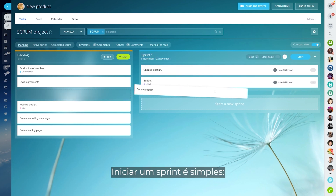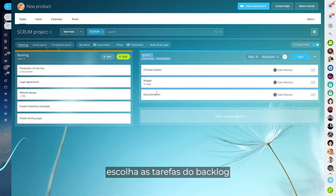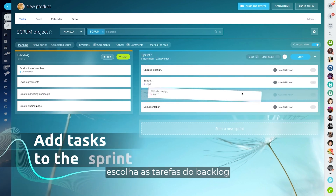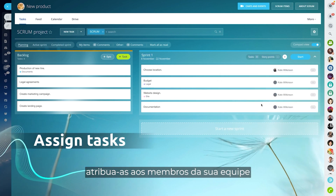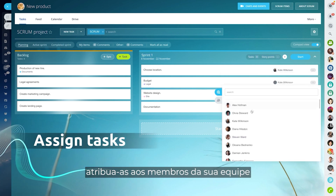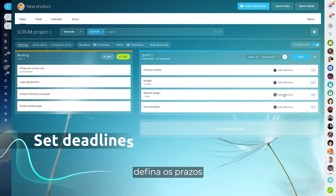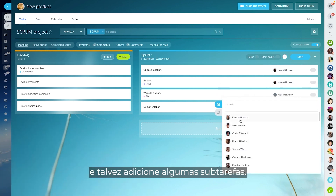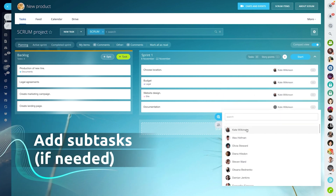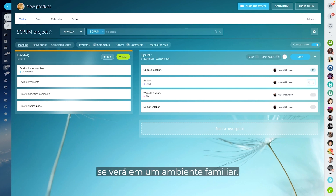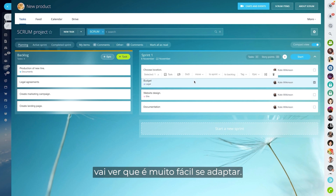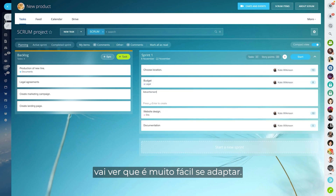To start a sprint, simply pick the tasks from the backlog, assign them to your team members, set the deadlines, and maybe add a few subtasks. Those of you who have used Scrum before will find yourselves in a familiar environment, and if you're new to Scrum, you will find it very easy to adapt to.